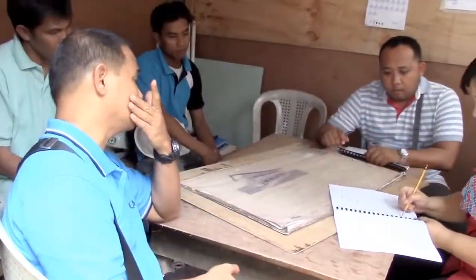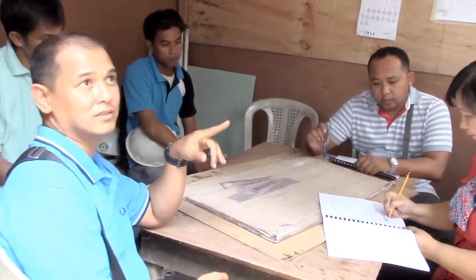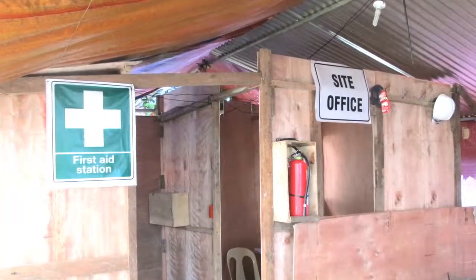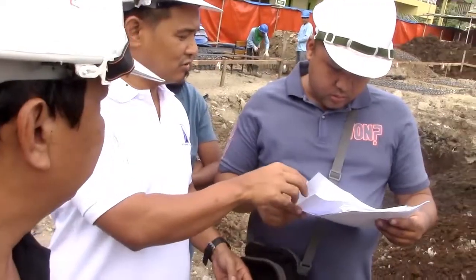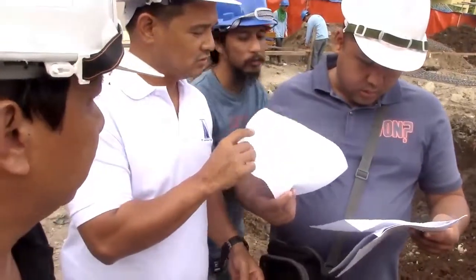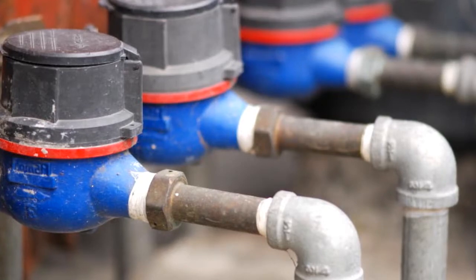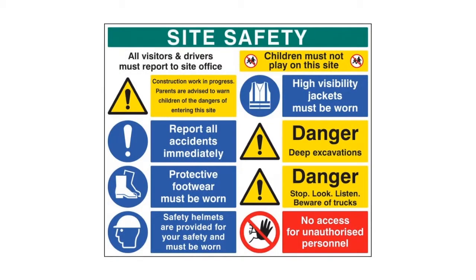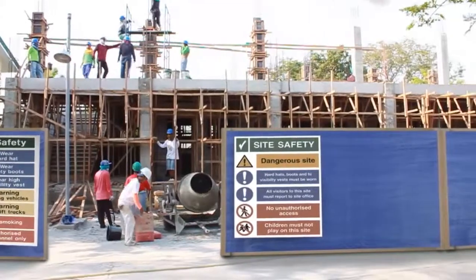Prior to the start of work on site, the principal should arrange an initial meeting with the contractor and the DepEd Division Engineer in order to discuss and agree about the contractor's on-site facilities, assist the contractor with documentation for possession of the site, agree how electricity and water will be used and settled by the contractor, and to ensure that the contractor understands key contract requirements such as the safety requirements, site security to ensure that the students cannot access the site, and the non-use of child labor.